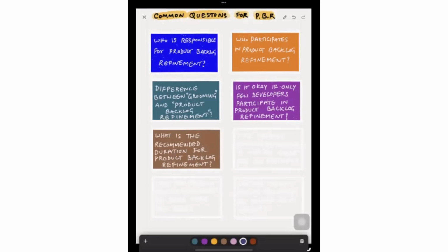My recommendation, and it's not a Scrum recommendation, as an experienced Scrum coach and Scrum Master, is that depending upon your velocity, you can decide the backlog refinement duration. For example, if your sprint average velocity or team's velocity is X story points, then at least 1.5 to 2x story points worth of items should always be available in the product backlog, which are explained, clarified, understood, estimated, and ordered. So keeping that rough 1.5x to 2x story points worth of items, how much duration is required, you decide.